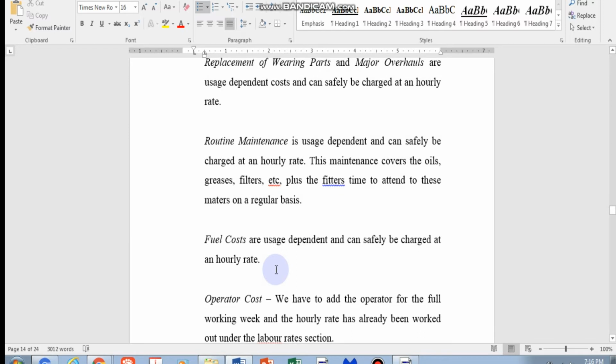So when we talk about estimates, it's actually a very simple formula. It's just the quantity times the rate. The quantity you need to work out from your project. As long as you know the quantity, it can come from the drawings, the BQs, or the design. So quantity is more or less fixed, unless you have extra work or you underestimate some quantity. The issue with quantity is just making sure it's as accurate as possible. And the rate is what I'm talking about for this particular recording.